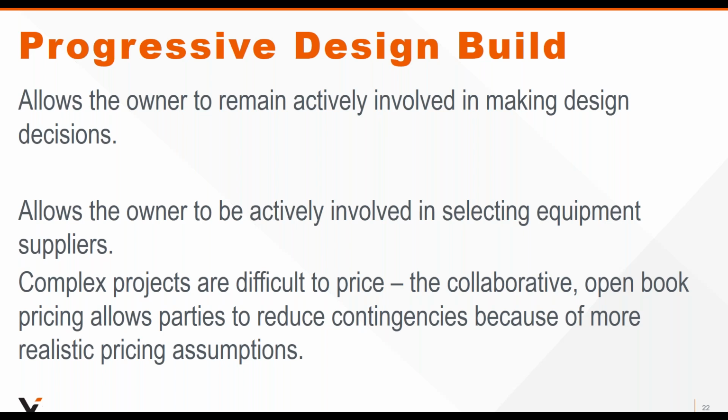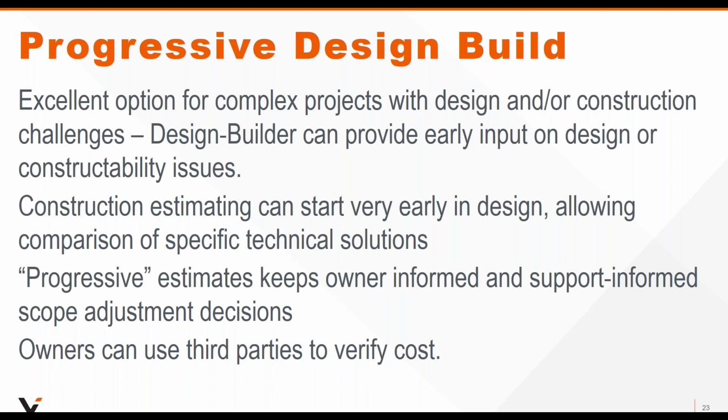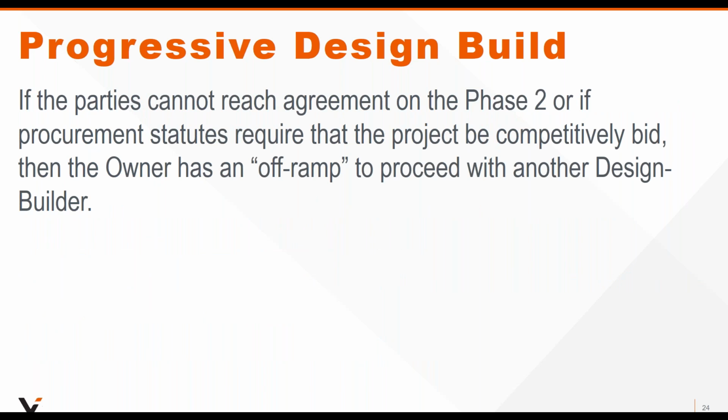You don't have a design builder who's being deliberately aggressive in hopes of winning the project. It's actually more open book. And for complex projects that often are difficult to price, this could be an excellent solution. There's progressive estimates that keep the owner informed and support informed scope adjustment decisions. And the owner, if they're not quite sure about the numbers that they're getting, can always use third parties to verify the cost that they're getting.